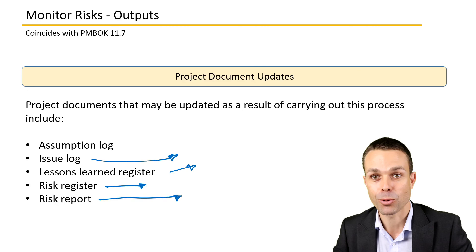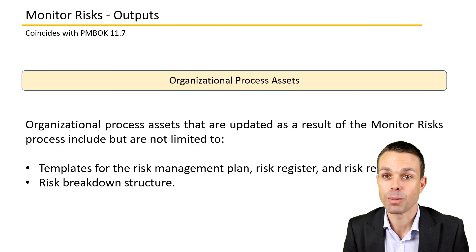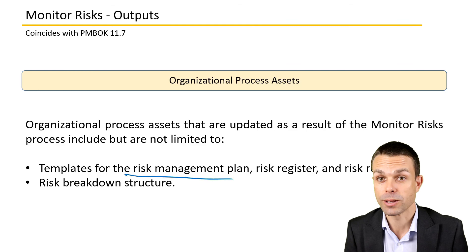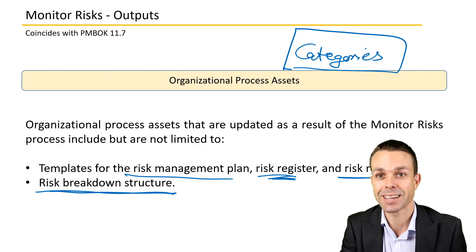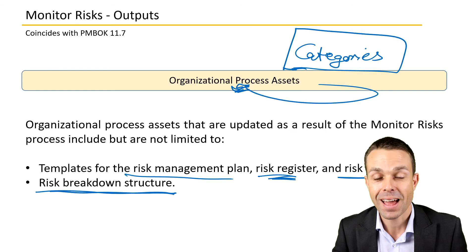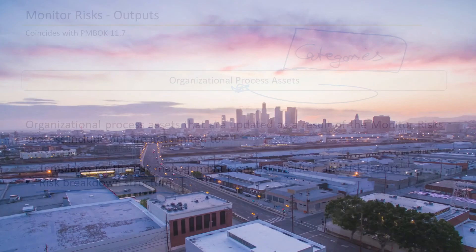And of course, lastly, organisational process assets, where we might need to update templates for the risk management plan if we're adjusting those within the organisation, the risk register itself or templates for the risk report, and the risk breakdown structure — we might be adding categories. So now we have additional risk categories that can go back into the organisational process assets. And those are all the details for monitoring the risks as part of the project management body of knowledge.